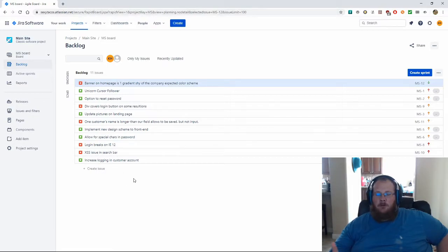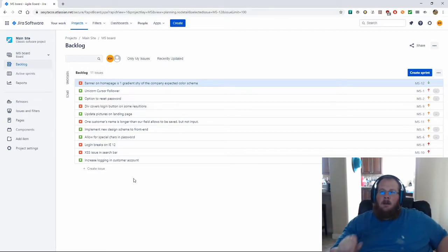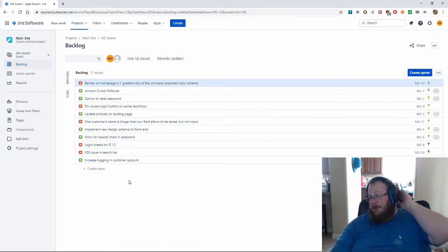And so what someone would do, likely a project manager, someone who has a wider view of the company's needs, would come to a backlog like this and start reading through everything and going, okay, let me prioritize these and put these in order of most needed to least needed. So some of the first things that they'll take a look at are bugs. Why? Because a bug typically will represent a hindrance or obstacle or heartache to an active customer.